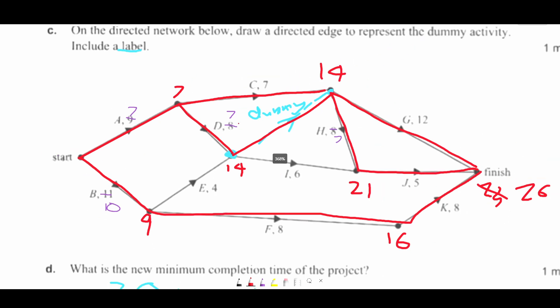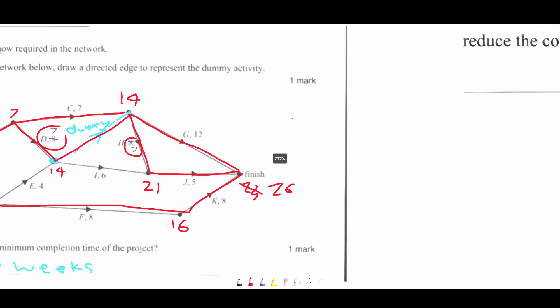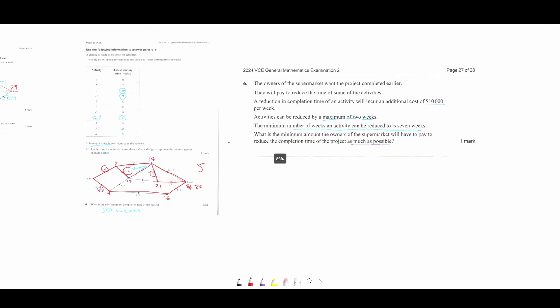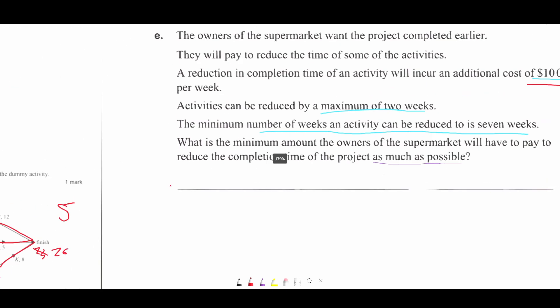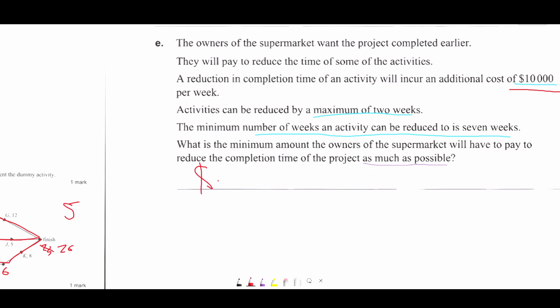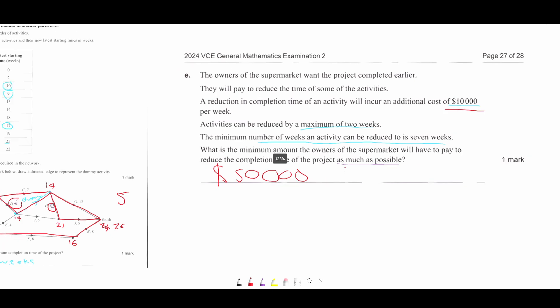So now let's just count how many reductions we've made. We've made one here, two here, one here, one here. So one plus two plus three, four, five. We've made five reductions. And they said that it costs $10,000 per reduction. So five times 10,000 is 50,000. So $50,000. That's going to be our minimum amount that we'll have to pay to reduce the completion time as much as possible.